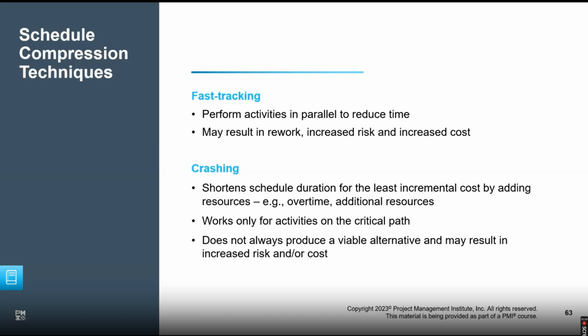Cost effective? Again, there's nothing called cost effective here. In certain scenarios, probably fast tracking will work. It depends on the scenario. There's nothing called cost effective, because in both cases you are going to get more people to do the job, so you have to pay for the resources again. In certain cases, you might see fast tracking is working for you. In some cases, crashing will work. And in some cases, nothing will work, and then you will have the baseline impacted. Even if you want to, nothing will change and your baseline will get impacted. So then you have to have a change request done.